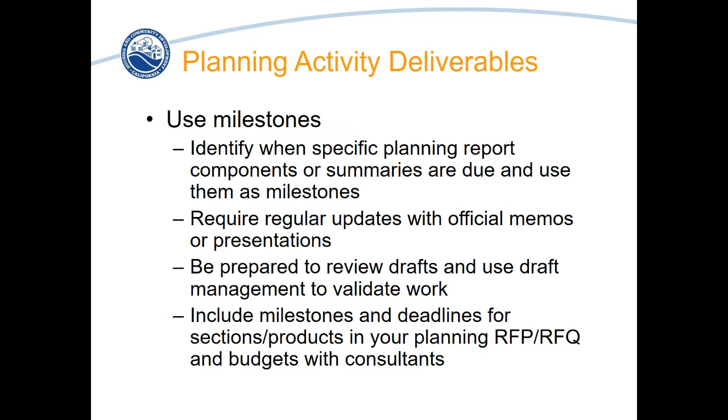When you're planning your activity deliverables, use milestones. They can really help you, especially once you've started to develop your activity deliverables chronologically. They can help you identify when specific components are due and what components need to come when. They can help you also to set regular updates. You should be requiring regular updates with some sort of official documentation from your subrecipients, your consultants, your project managers, your construction managers, your architects, whoever you're working with.